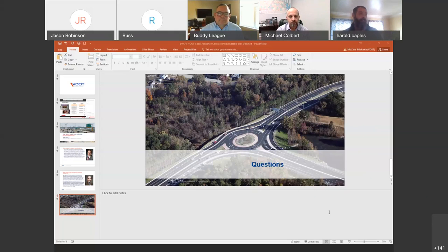I know, talking about utilities, though, that those in plan or out of plan, I know the out of plan utility questions we get a lot of, because relocations may have taken place prior to, but the utility may have left poles in place, stuff like that, where we're providing answers because it looks like the utility's not there. Y'all are seeing it, and if we're not able to give you an answer as to whether or not it's live, you're going to have to price that risk into your bid. And if we can give that clarity prior to the bid submission, you can relieve us of that risk. I know that that's one of the things that we do from our side of the house, as it pertains to asking questions and specifically regarding out of plan utility impacts.